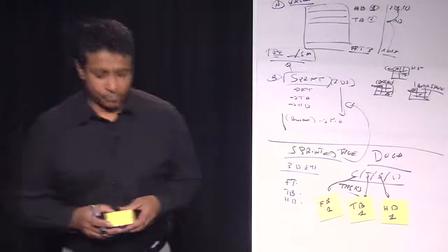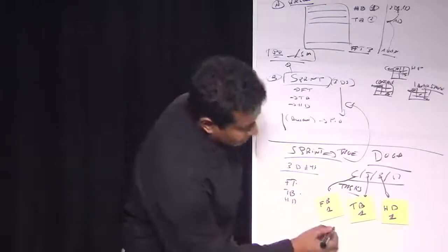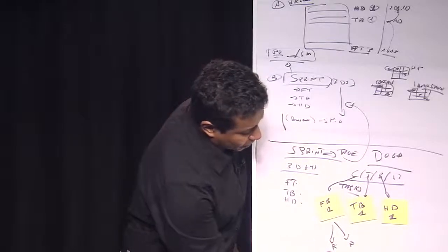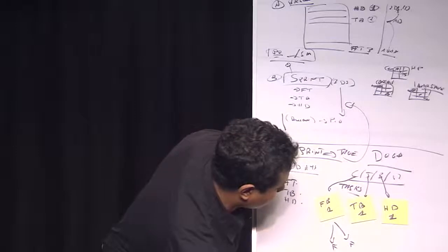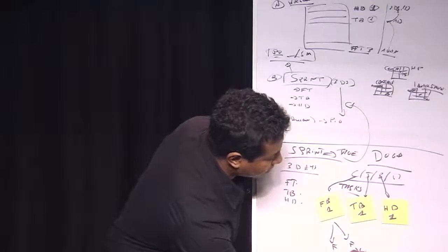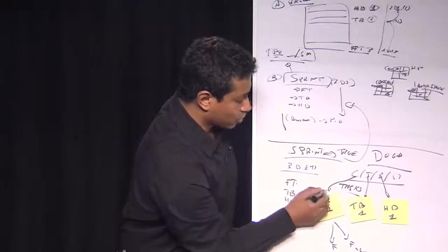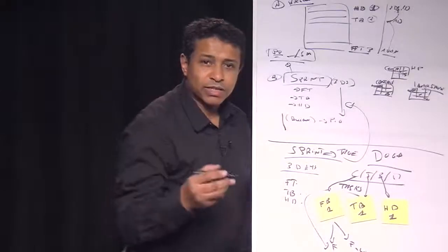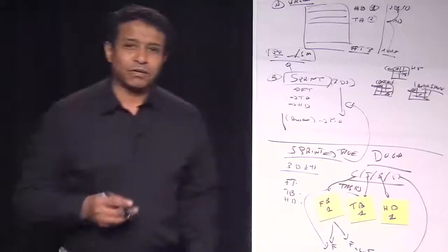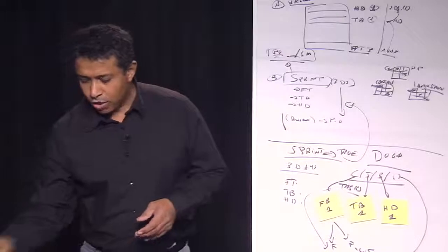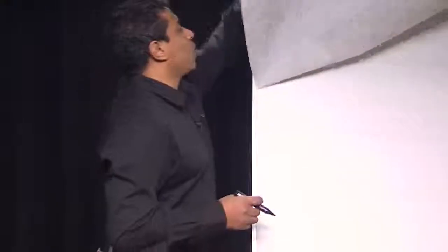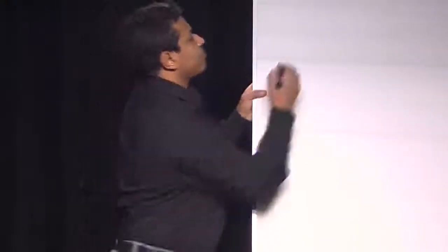So what about Mark? It can happen that the task can be split in two functionalities. Let's say icon here, build icon, and next say link. So let's say Charles will set the icon in the front office, and let's say Mark will set the link on the home page. So the devs, they are in Agile working in that way.